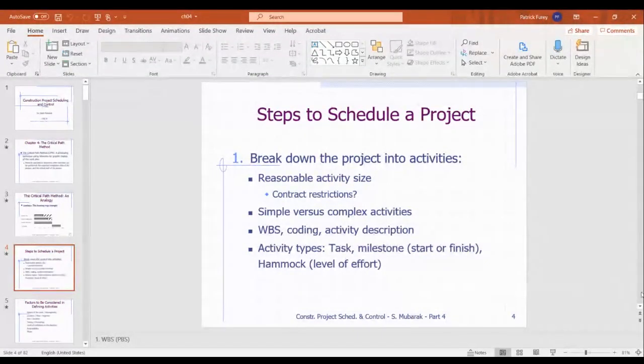So milestones, you could have construction milestones, you could have project milestones like design development or schematic design. You can have owner related milestones, like we switched over the air compressor system from the old one to the new one. And like I said, sometimes it's even payout related. So you want to be able to easily quantify exactly what that milestone is. The worst thing you can do is make a milestone ambiguous. That's going to leave everybody in the project the room to interpret that gray area in their favor.